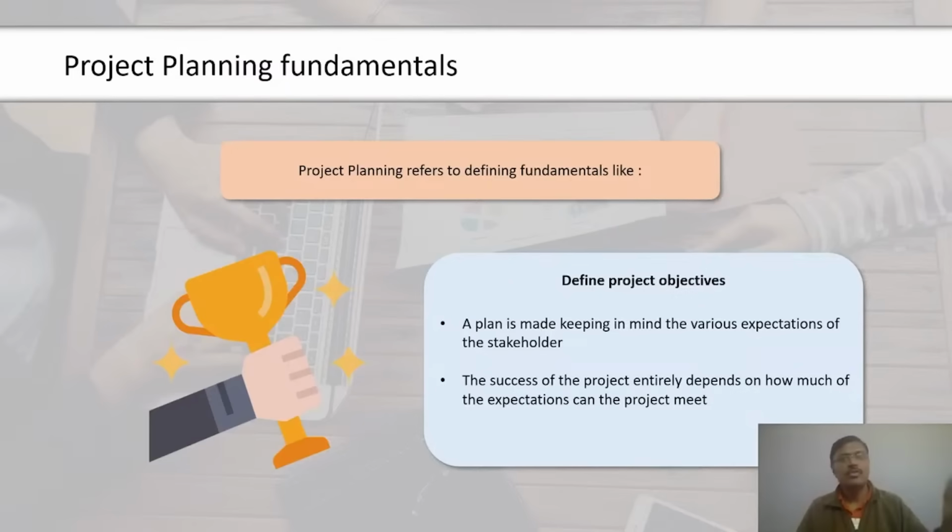Work performance data contains the information about the project progress. The important tools and techniques used in controlling costs are earned value management analysis, forecasting, and the to-complete performance index. Other important aspects of controlling costs are performance reviews, analyzing reserves to make sure the project has enough budgetary reserves to meet expenses, and project management software, which helps in tracking and managing costs.